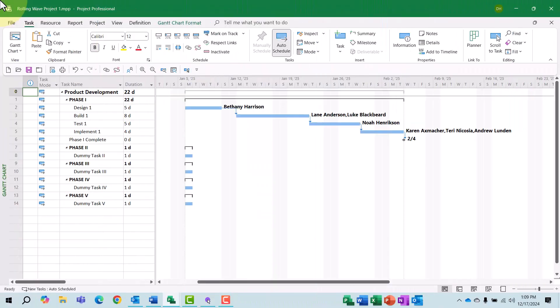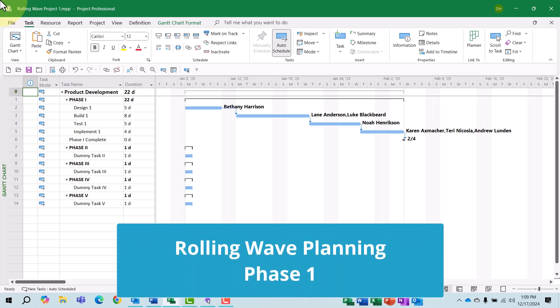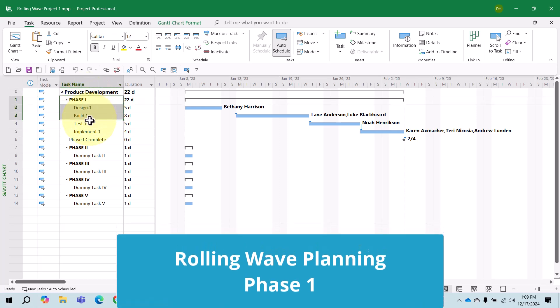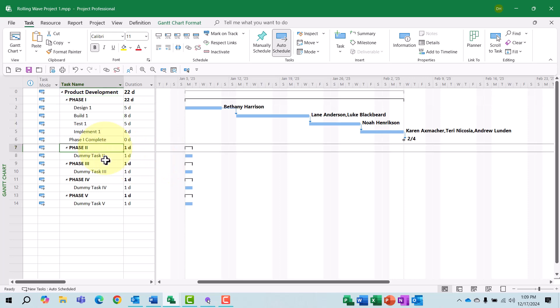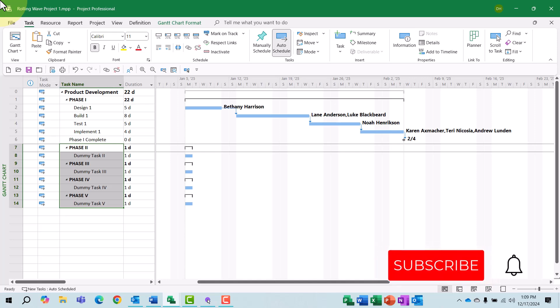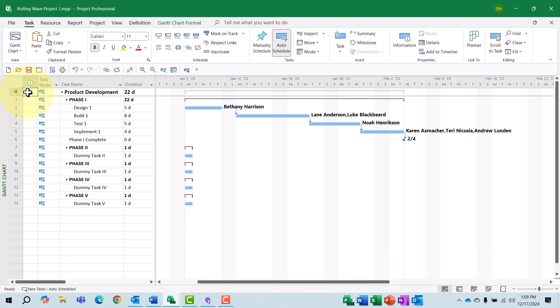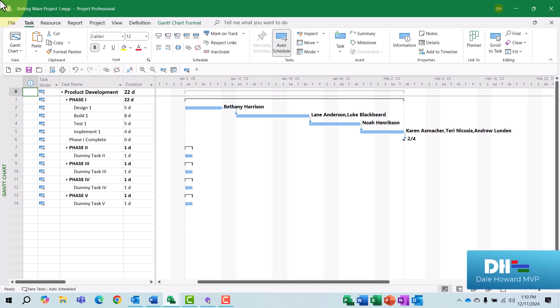So here's a project that is ready for rolling wave planning. Notice that I've completely planned all of the tasks in Phase 1. But in Phase 2 through Phase 5, I have only included a dummy named task that will serve as a placeholder task for future tasks in that section of the project. At this point, I'm ready to save a baseline for all of the tasks in Phase 1 only.